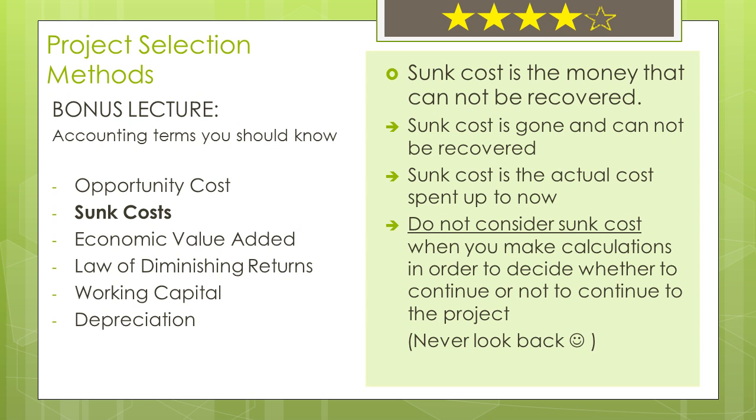Do not consider sunk cost when you make calculations in order to decide whether to continue or not to continue the project. For example, if you spent $100,000 up to now and you need to decide whether to continue or not, do not consider this $100,000 while making your decision. Just remember this. Never look back.